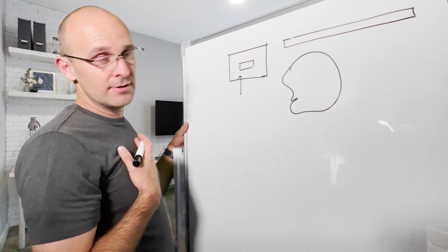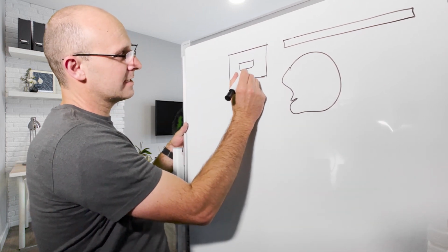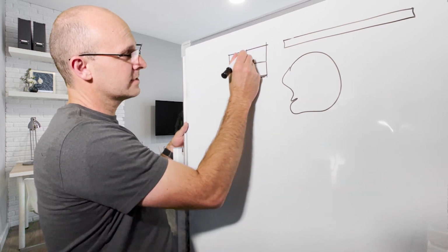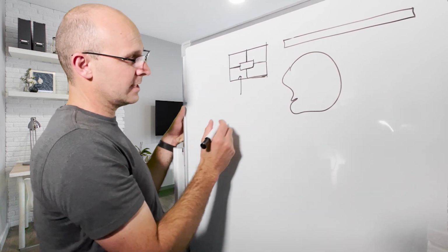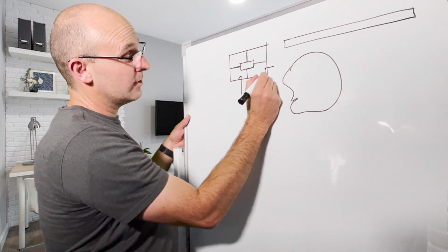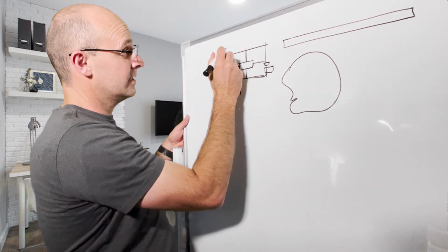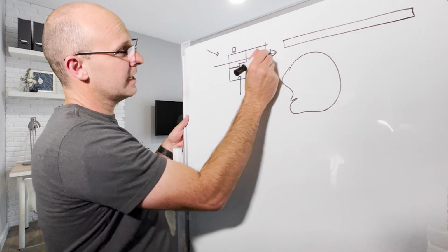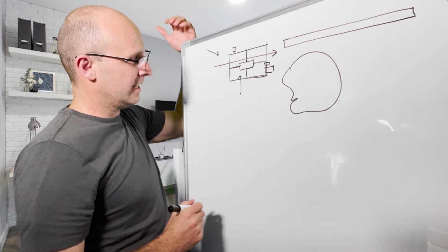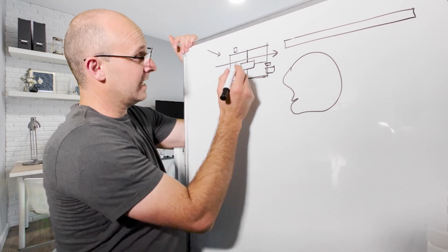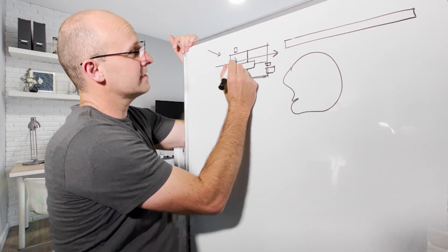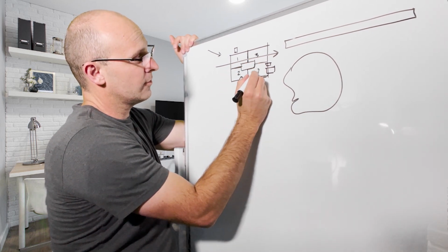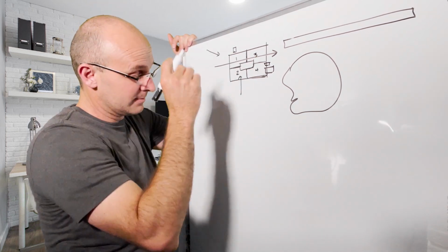The first thing that I do is I break this out into Takt zones. Basically, what is my best guess to how we're going to break this out from a builder standpoint, right? And if here's the hoist and the trash chute, and here's the crane, and here's where deliveries come, I generally look at, hey, what's going to be the general flow of that area? And that will help me to guess. Like I said, we're starting out here guessing this is probably going to be Takt area 1, 2, 3, 4, or it'll be 1, 2, 3, 4, whatever the case may be.